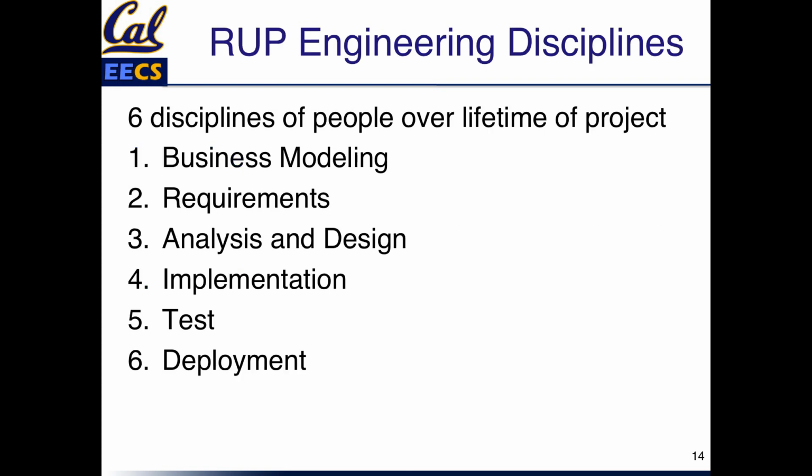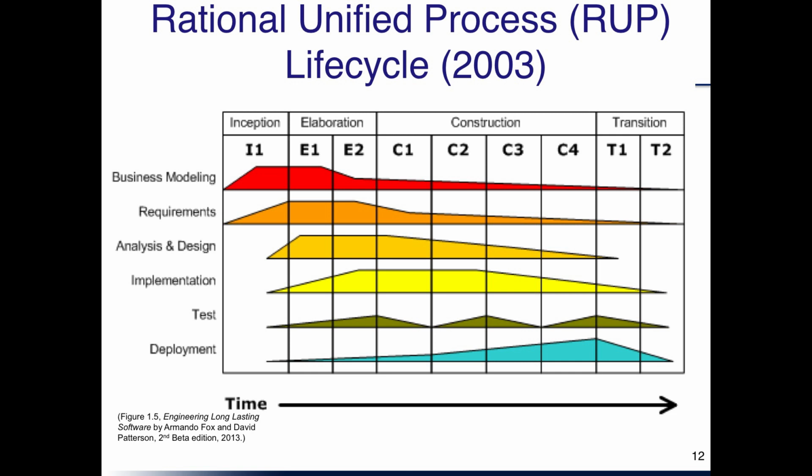The engineering disciplines that you'll need, and that vary over the lifetime of the project, are business modeling. This is to make the business case, doing the requirements, the analysis and design, implementation, test, and deployment. So let's go back to see how those all fit together in this slide. So here are the requirements, and you can see the business modeling plays a bigger role in the inception phase, and at the beginning of the elaboration it kind of dies off.